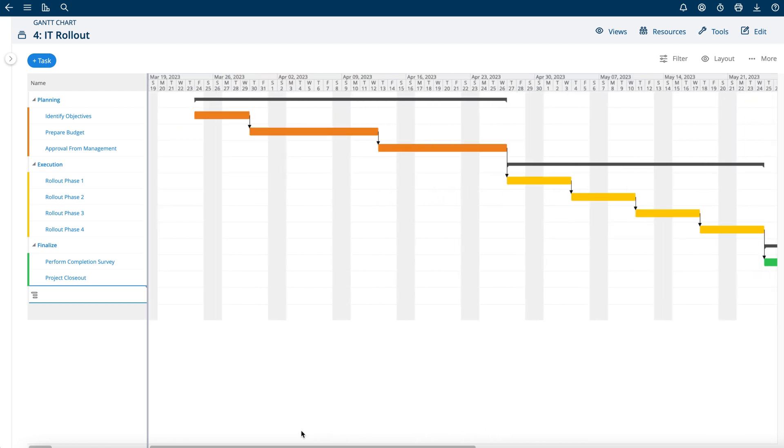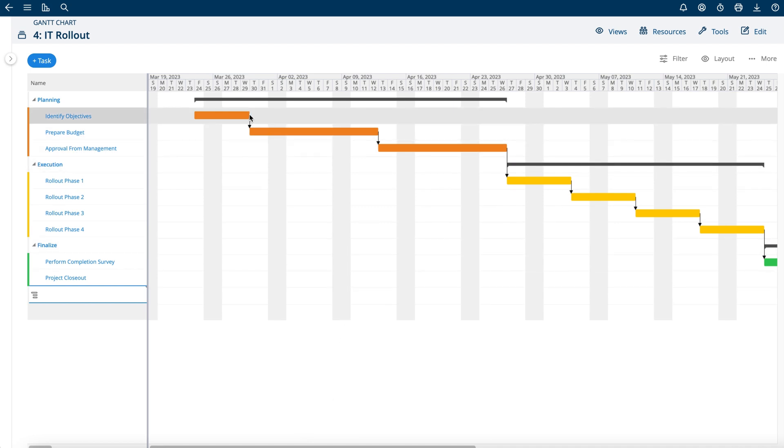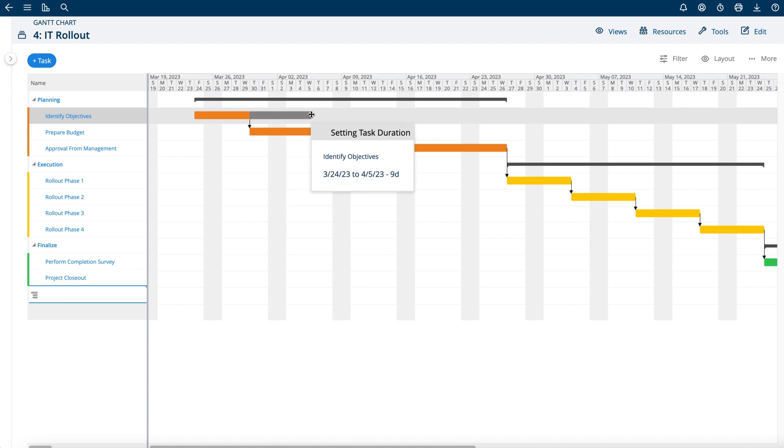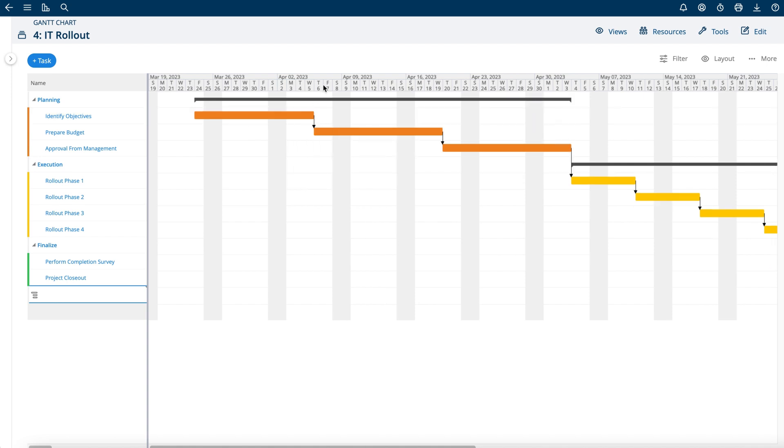Another thing you can do here is if you want to extend the length of the task, you can drag it this way and that will now shift everything out for you.